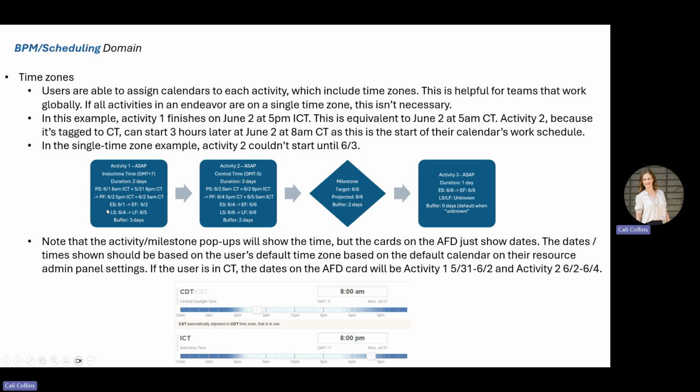So let's run through that one again. Activity 1 started on the 1st at 8 a.m. Indochina time and finishes at 5 p.m. on the 2nd Indochina time because it is a 2-day activity. The second at 5 p.m. Indochina time is equivalent to 5 a.m.